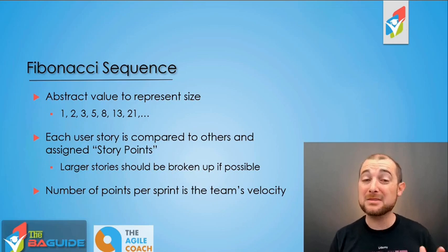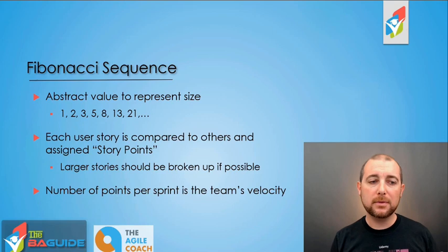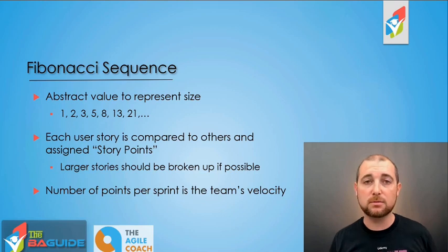As well, a lot of times the 8 is kind of looked at and determined, hey, can this be broken up at all? Because the smaller the stories are and the smaller story points are assigned, the easier that task is going to be completed, and the more likely you're going to be able to get it done within the estimated time frame that you're expecting.